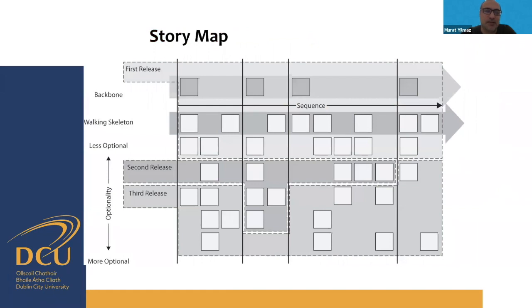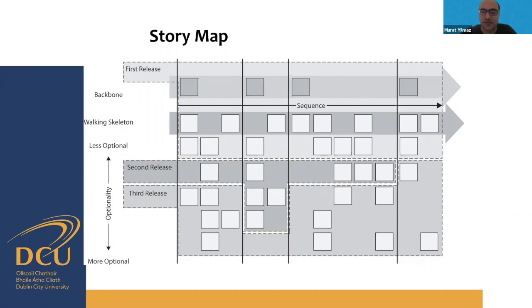Stories can be represented on a story map board showing releases, backbone sequence, and stories ordered by optionality — less optional and more optional. The second release is generally less important than the first, and so on. This is a story map. You can also use a Kanban board or Scrum board — these are fully customizable. The most important thing is that your team has a product increment ready after each sprint.